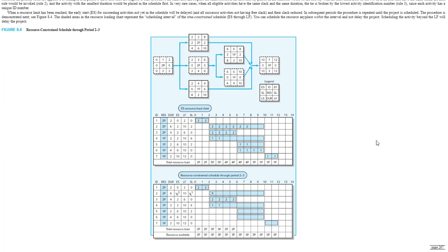This is the exercise that a project manager typically goes through when assigning resources to a project when there's not enough resources. And as we see, what starts happening? The activities start getting pushed out. Now, if you try doing this in MS Project, where you assign more work than a resource is capable of doing based upon the number of hours in their calendar, well, you will see an alert that that resource is overallocated.